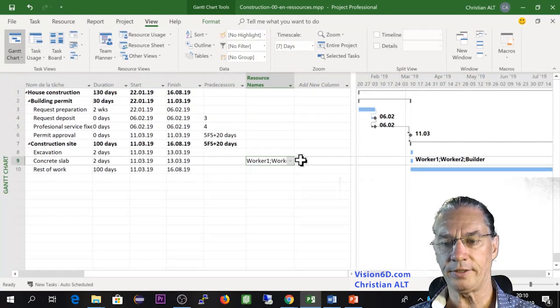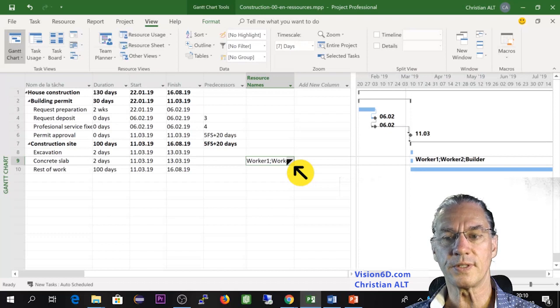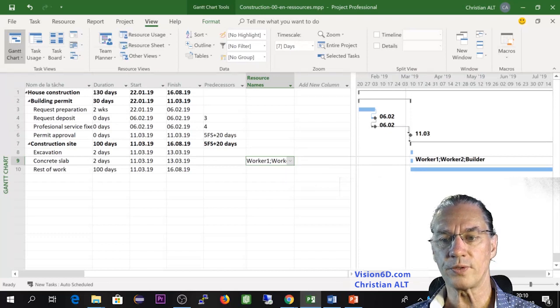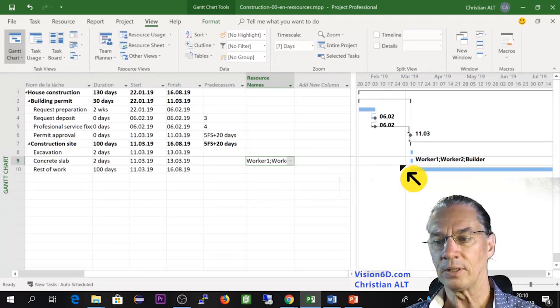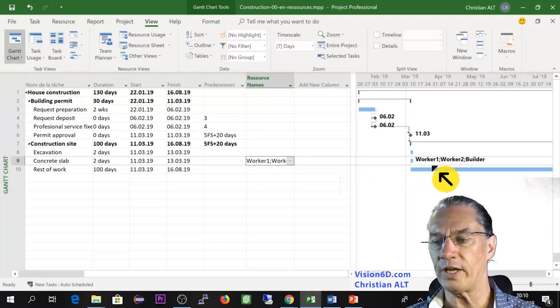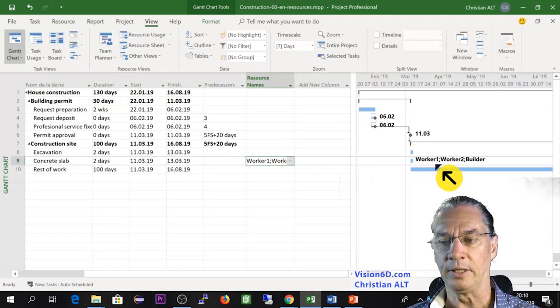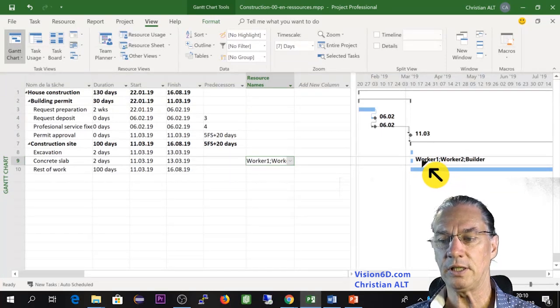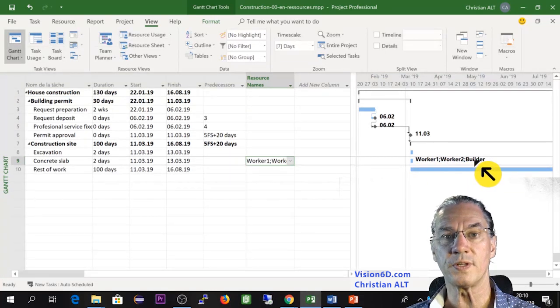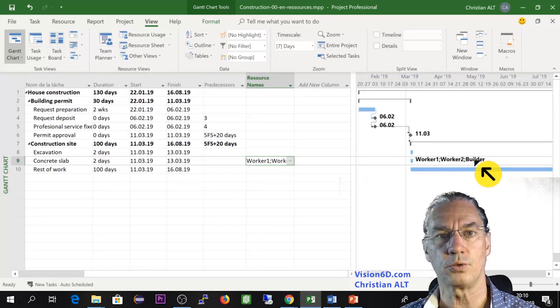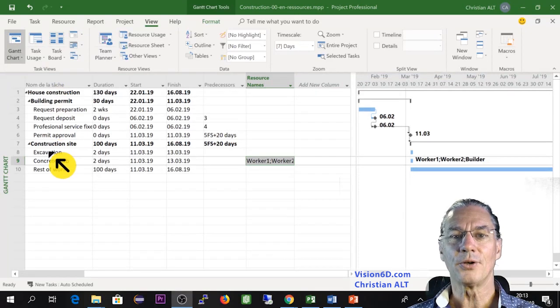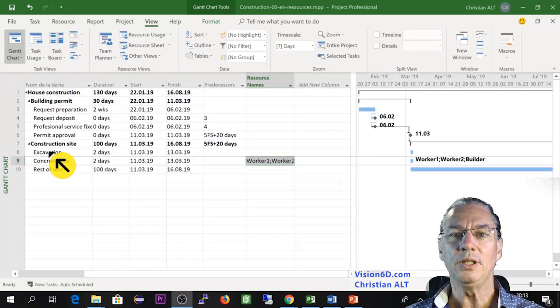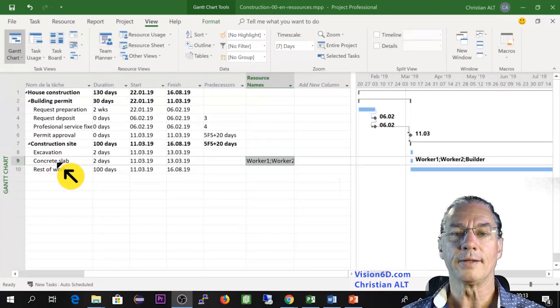For this I'm saying that I need a builder and two workers and we see that immediately here it has come on the line and each resource name is here present. And you see also here on the diagram on the Gantt diagram you immediately have the list of the resources necessary for this task to be accomplished. So now to be able to do my basement.